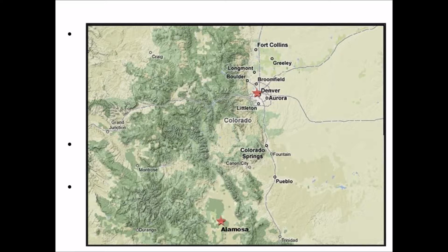It focuses on the primary response challenges, the immediate causes that led to those challenges, and the contributing factors. And these contributing factors can be things that are modifiable, and those are the ones we want to think about changing so we improve in the future. Unmodifiable or predetermined root causes are things that we at least have to be aware of and find ways to address in the future.